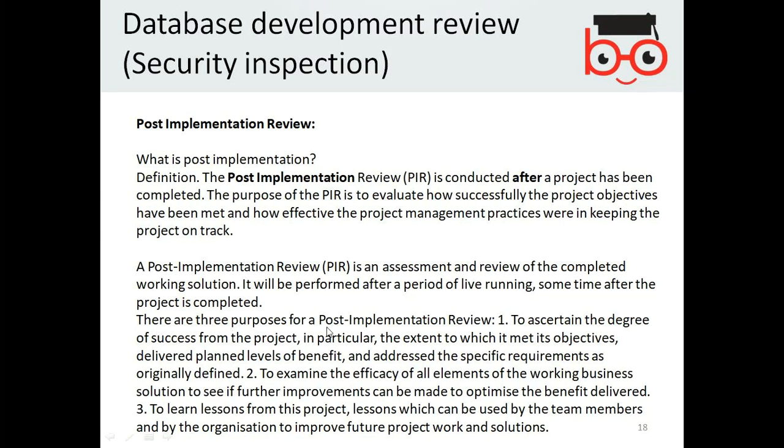There are purposes for post-implementation review. Number one is to assess the degree of success, that is, at what level this project is successful. To examine the efficiency of all elements of the working business solution, so improvements can be made. So how successful is it? How efficient is it? Is there any improvement needed? And to learn lessons from this project, lessons which can be used by team members and by organizations to improve future projects, work and solutions.